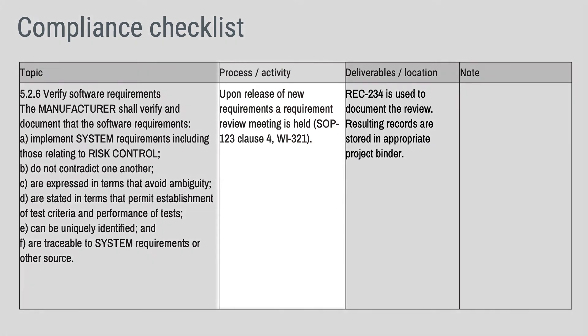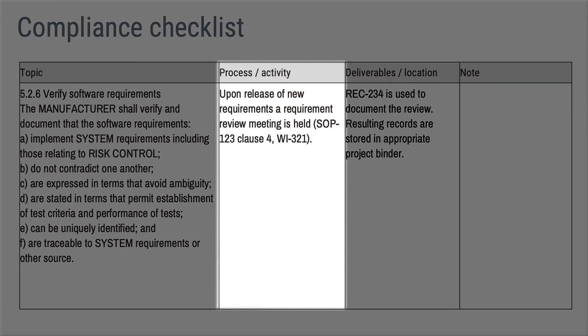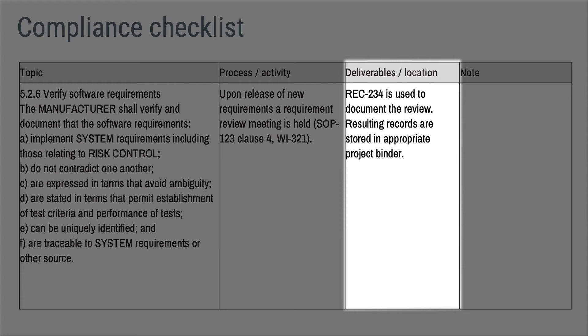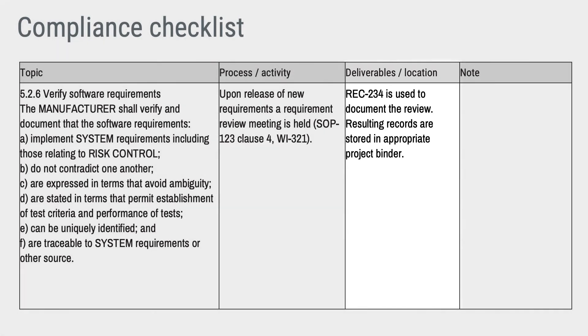Now over to the very same requirement, but with a different approach. For the waterfall approach, I reference an SOP and work instruction on how to conduct verification of requirements. For the deliverables, I provide a template to document the review. For this example, I've assumed a paper-based system so the resulting record will be kept in a physical binder. So with regards to the choice of development method, it is your choice to choose what's appropriate for your organization. But the more you move away from the linear structure of a standard, the more you will benefit from a maintained checklist.